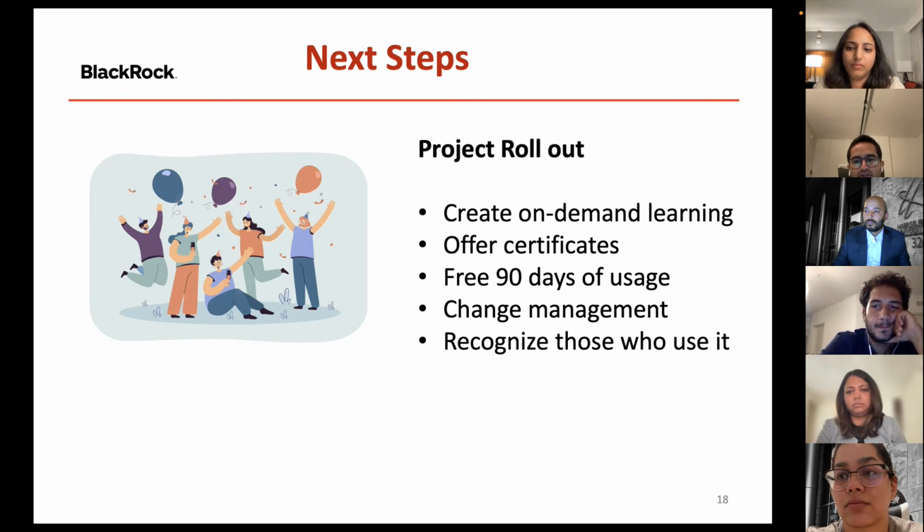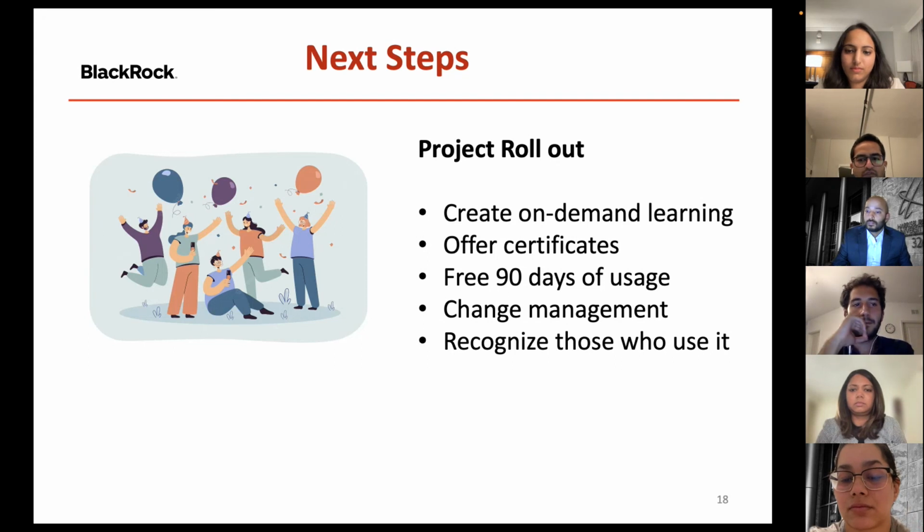Our first stage of the rollout plan will be to involve a pilot group who will test drive the tool. As a big company like BlackRock, it has numerous verticals. We will use a diverse pilot group involving different teams, backgrounds, tenures, etc. And we're definitely not shying away from the people who ask a lot of questions, as their feedback will help improve the tool in the long run.